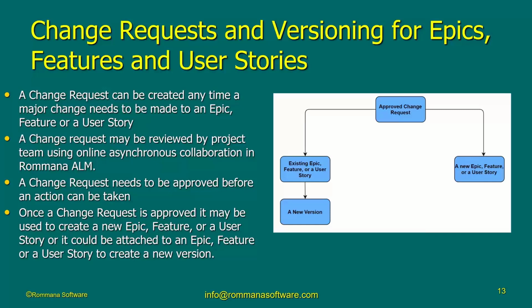However, at some point, if you baseline the user story, any changes after that need to happen through the very well-known mechanism we call change request. So a Scrum Master, a product owner, whoever is running the project can create a change request.